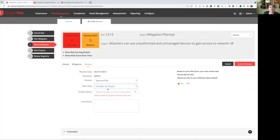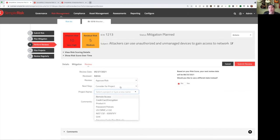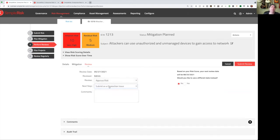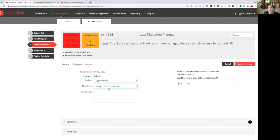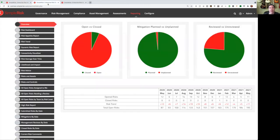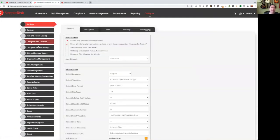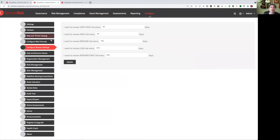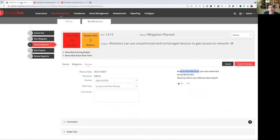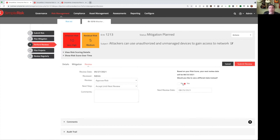We're going to go ahead and accept this until next review. We could add a comment. And then based on the risk score, we're automatically going to calculate the next review date. This is configurable. If you go to the configure menu and then configure review settings, you can set how often you review risks of different risk levels. So right now I'm looking at a very high level risk, which means that we're going to review it every 90 days. So 90 days from today, we're going to set the next review date. You can override this if you want to and set a different date. But for now, we're just going to accept the default.